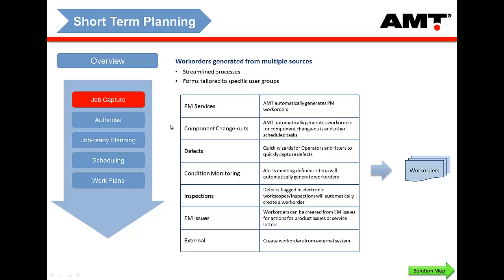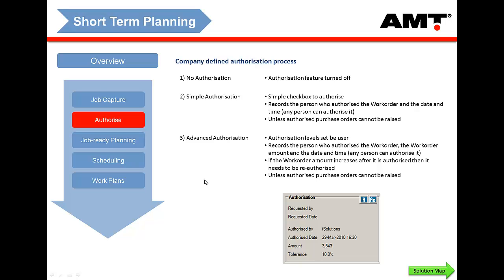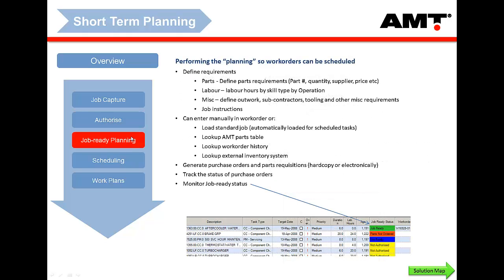The next step is that the planner ensures the job is correctly scoped and authorizes the work — for very large items, special authorization may be needed. The detailed job planning then really gets done within SAP. From AMT, once the user decides to perform the work, there's a button they click in AMT that will automatically create a work order within SAP and transfer across the parts listed and labour requirements listed within AMT.